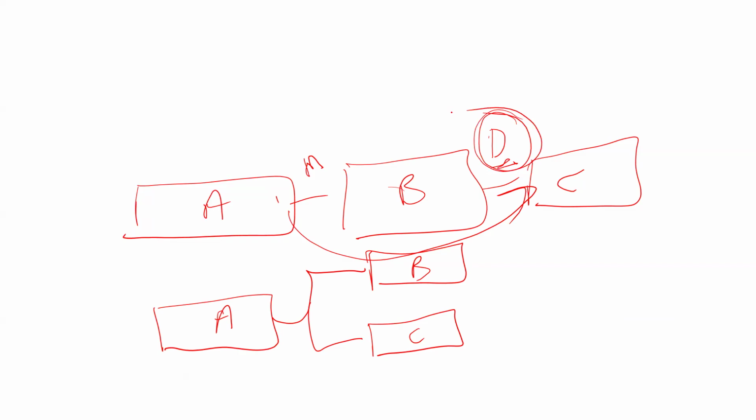Revealing the next topic, because in your batch the questions and discussions are interesting, so they are coming across a few things which will be coming down the line. Let me explain it to you. This is called fast tracking. You are trying to fast track the project. What does fast tracking mean? You are trying to run two things in parallel which earlier you were going to do sequentially. Earlier it was A to B to C. Now it is A to B and A to C. What you have done here is called fast tracking. Is that clear? Yeah. What is the advantage of fast tracking?